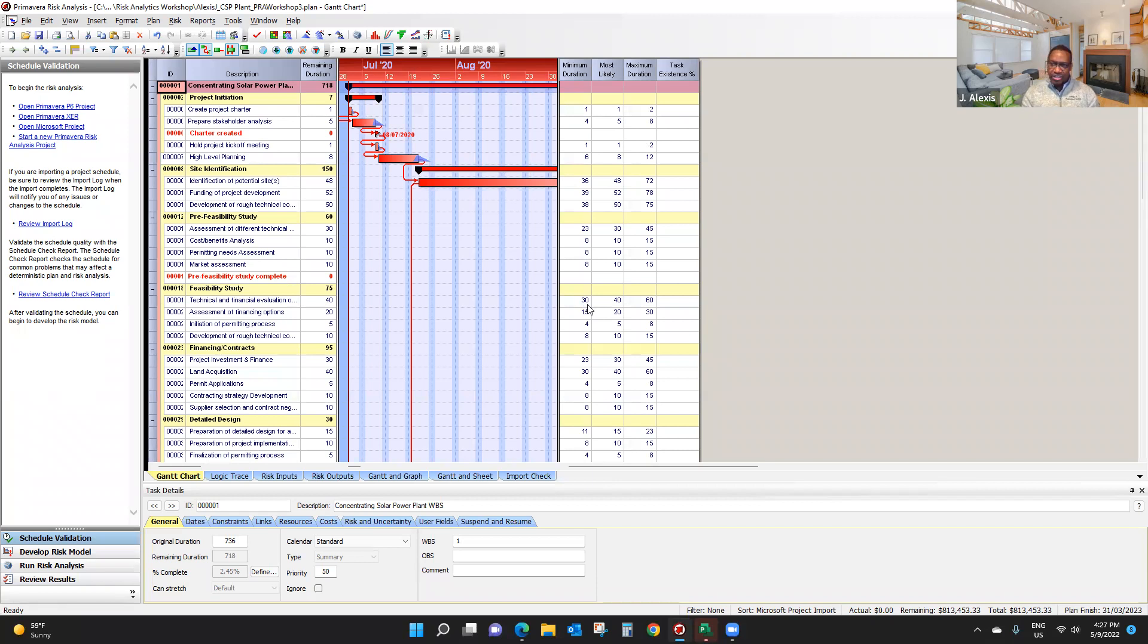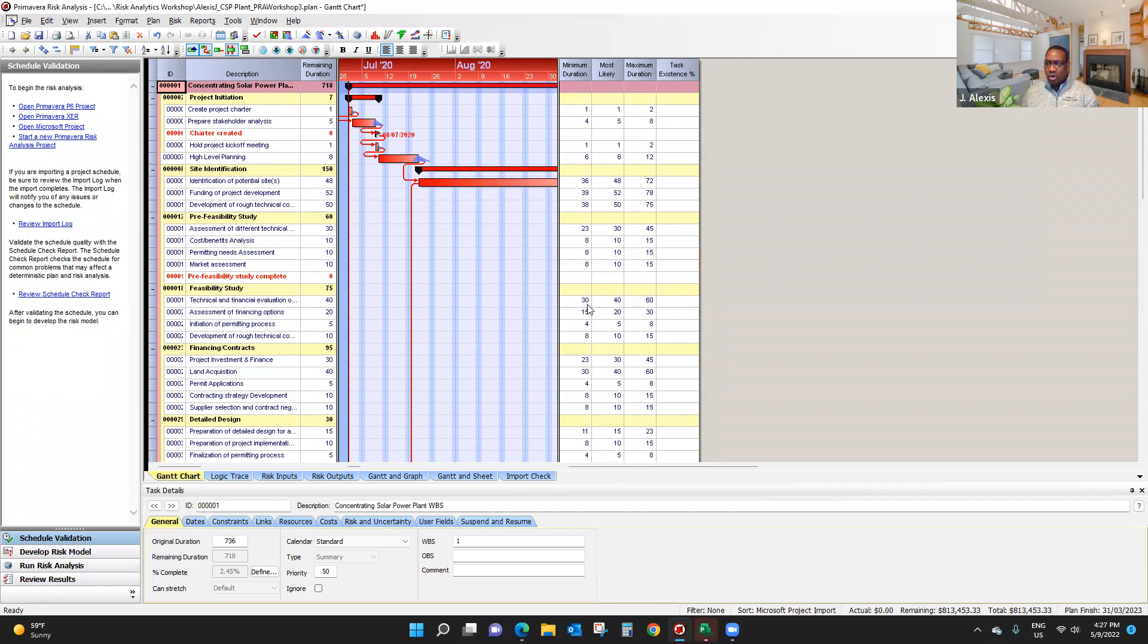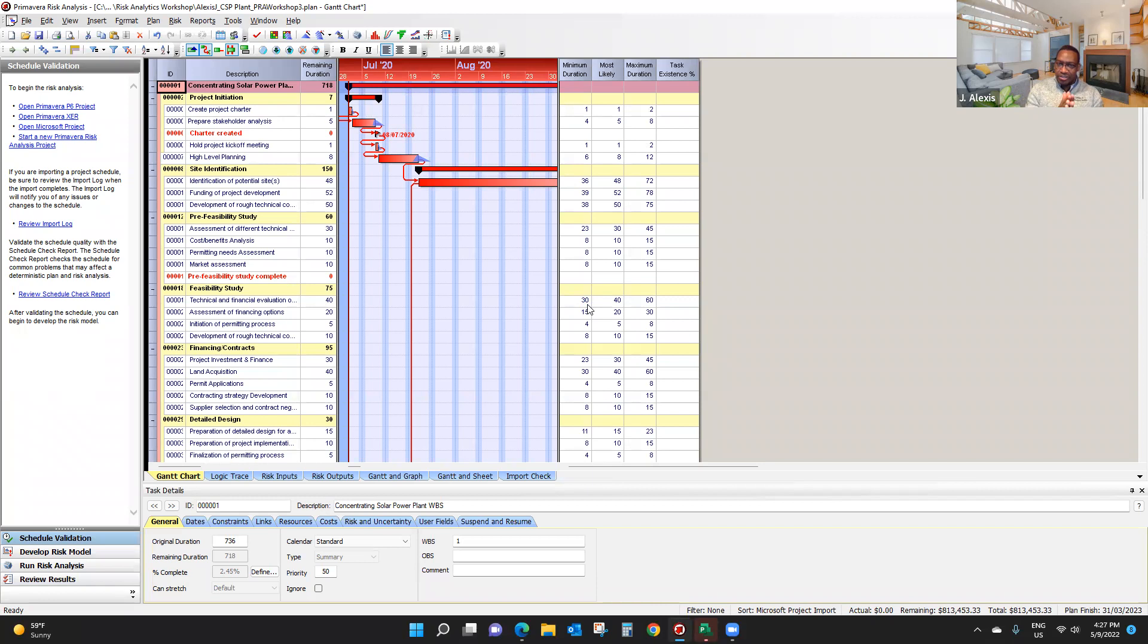The average estimate can be based on a weighted average, the case of the beta estimate, or it can be based on a simple average, the case of a triangular distribution.